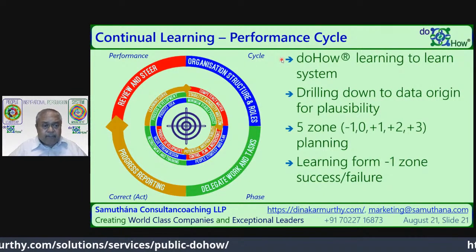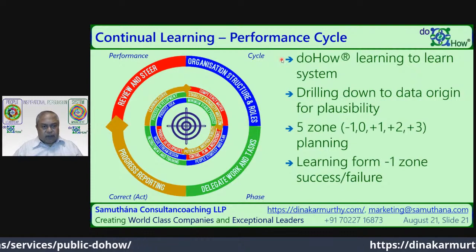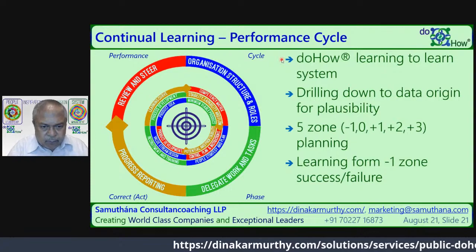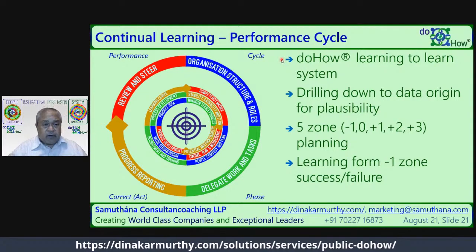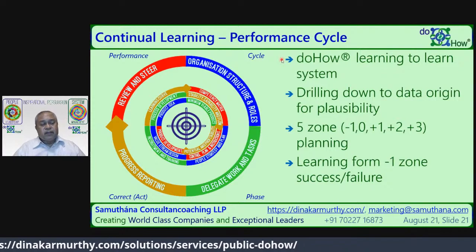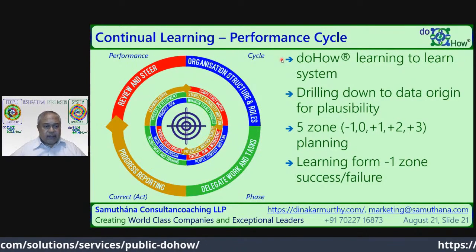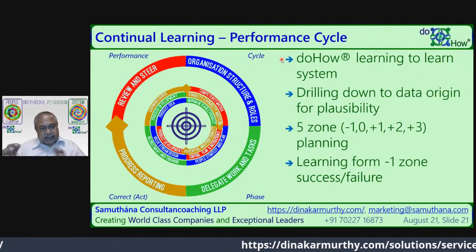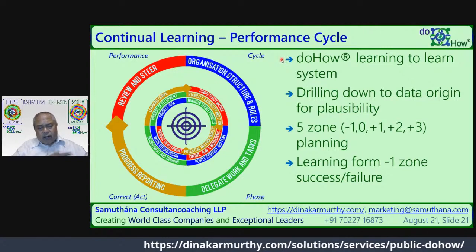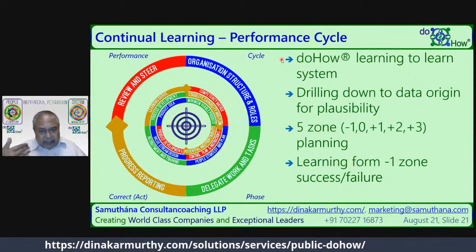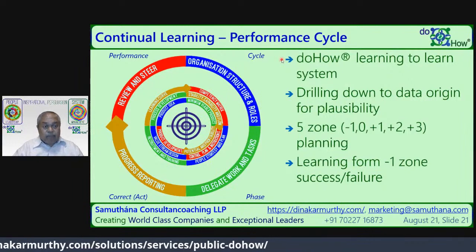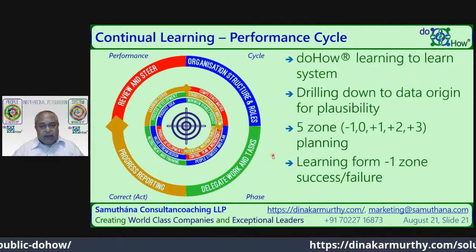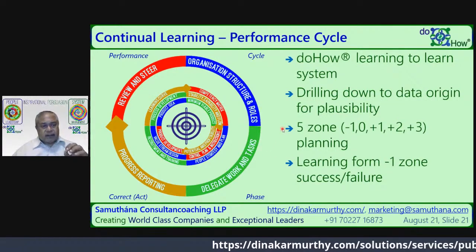And again here, based on the full kit which is defined for that particular activity, imagine something like a structure. You must be having a good idea about the product structure, where you're talking about a BOM, bill of materials, which says for making this product I need so many materials. So imagine something like that if it was available for a full kit. That means if I say this activity has to be done, for that what all are required for the activity to be done, then the technology can check whether those items are available and then predict when it would be available. So based on that, the plan can be frozen. So the smartness in planning is to make a plan which is executable.